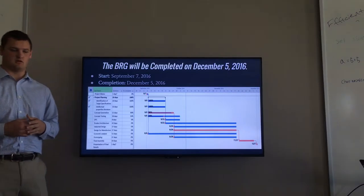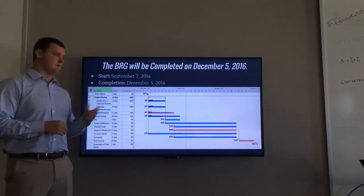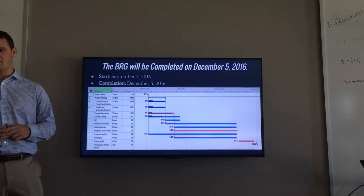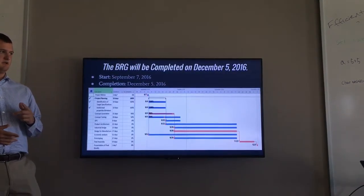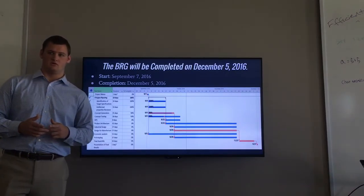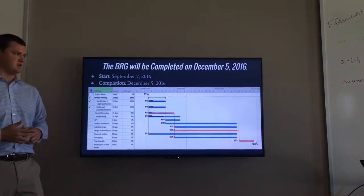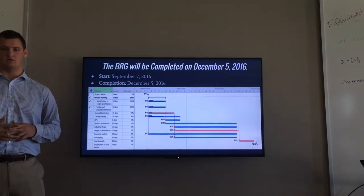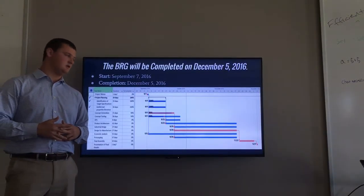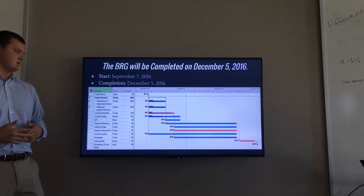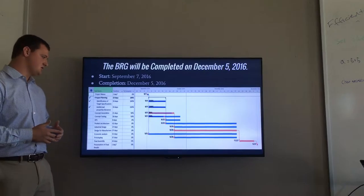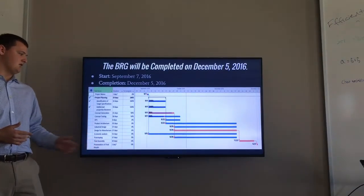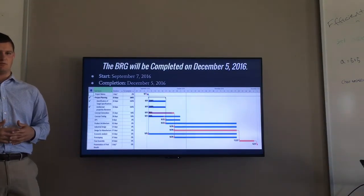After the focus and competitive strategy were determined, we made a Gantt chart to help guide us through this project. We started with a project planning phase, which included identification of target specifications, literary searches, and concept generation. Concept generation was a critical task as it sets up the rest of the project — determining what devices we'll use. The actual design for manufacture and final assembly, giving customers a final product, were also critical tasks.